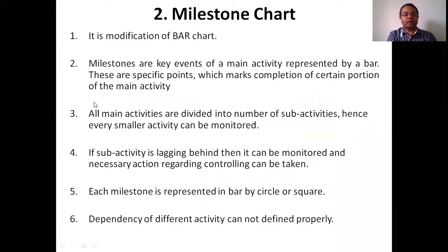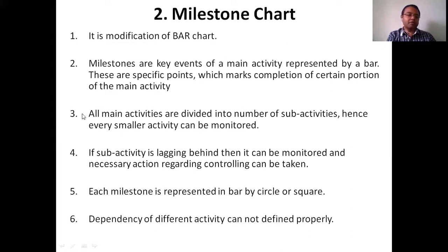All main activities are divided into a number of sub-activities, and every smaller activity can be monitored in a better way. We can follow different standards, so the total quality of work will be enhanced. Because of dividing the total activity into smaller activities, we enhance the total quality of a project. Also, if a sub-activity is lagging behind, we can monitor it and necessary actions can be taken for controlling.